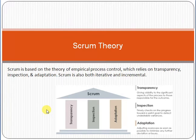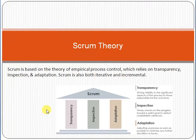In the traditional waterfall approach, customer feedback is received at a very late stage — during user acceptance testing. At that point, corrections are very difficult to accommodate because all functionality is already developed and organized. Now that we understand the scrum framework, we can talk about scrum theory.